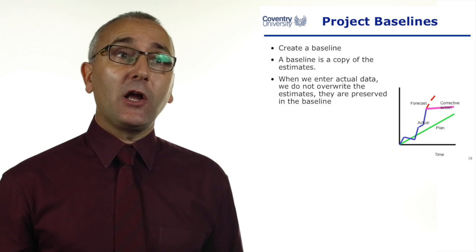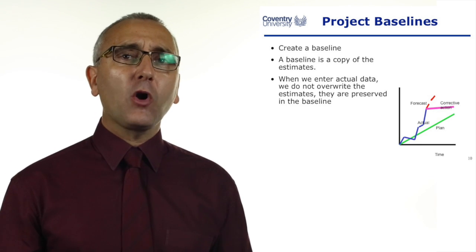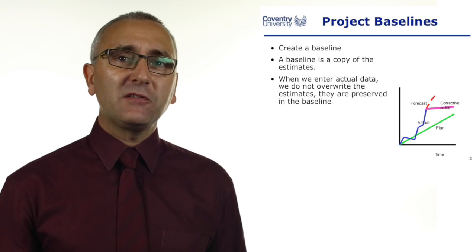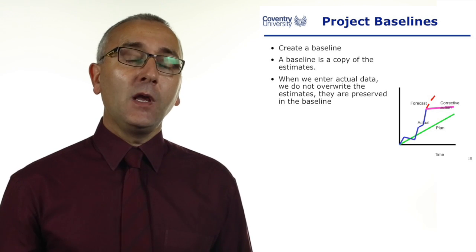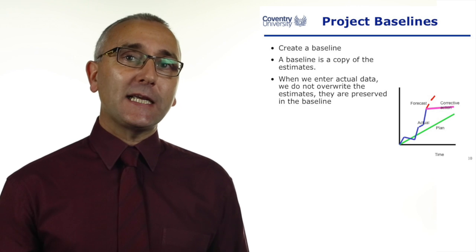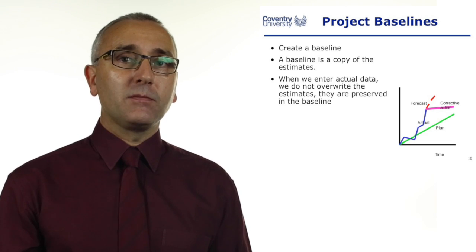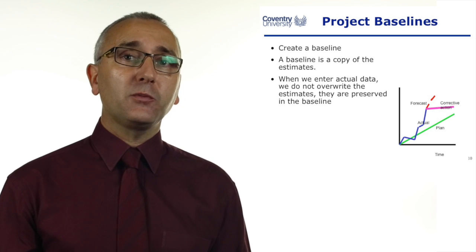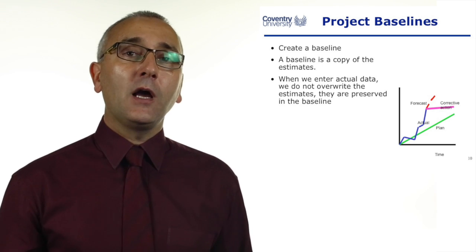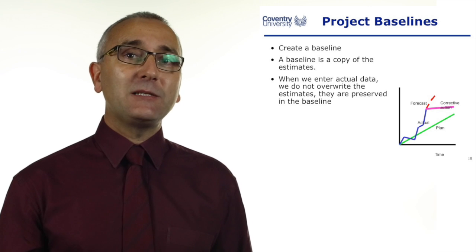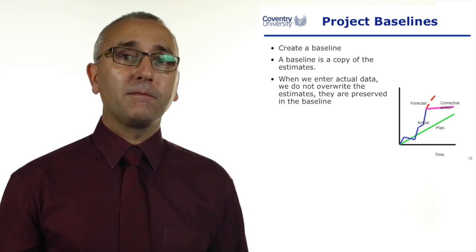So, a project baseline is a copy of the estimates. When we have the plan as refined as we think we can get it, we copy the estimates into a baseline, and then when we enter the actual data we're not overwriting our original estimates. You do this in Microsoft Project — we'll have a PC lab on this if you're on that module — and we'll actually copy the estimates into the baseline, put in some actual data, and compare where we are.